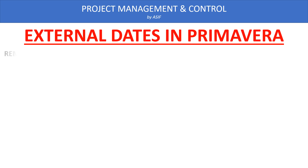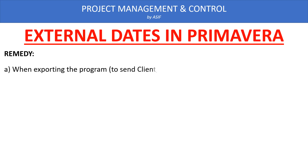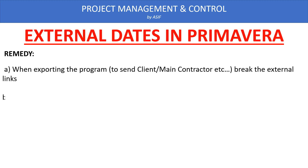Now we will see how we can protect our program and what remedy measures we can take. Number one: when we are exporting the program and we know that it is inter-linked with other projects, we have to break this link before exporting, before importing this program to send to our client, consultant, or subcontractor.